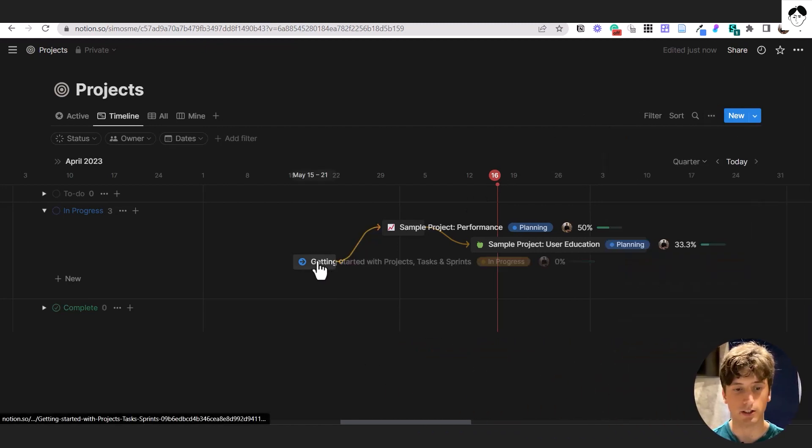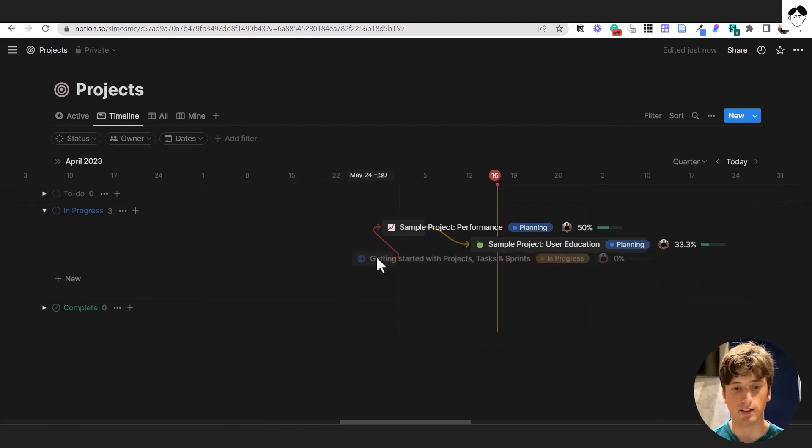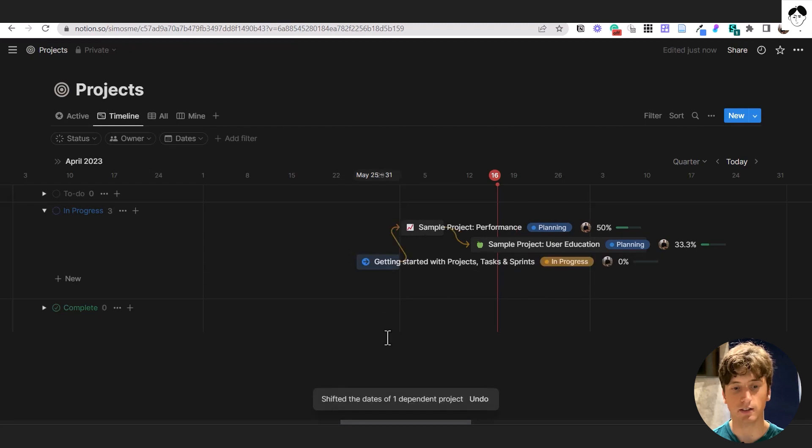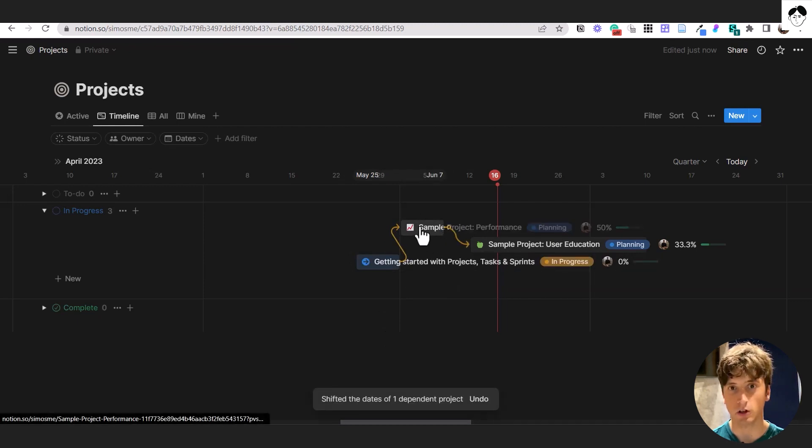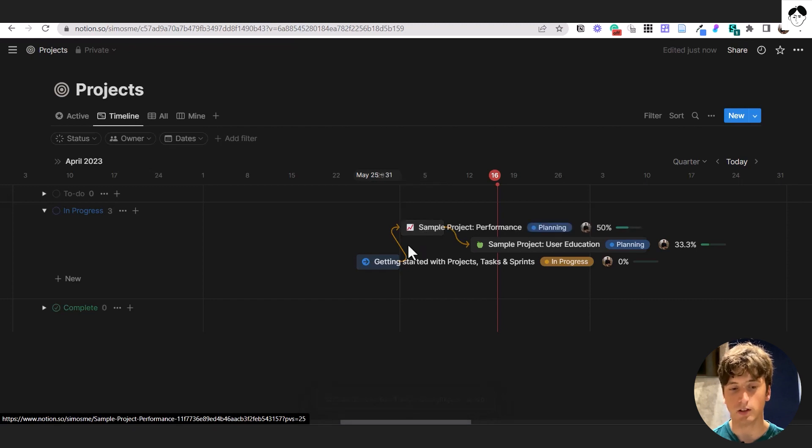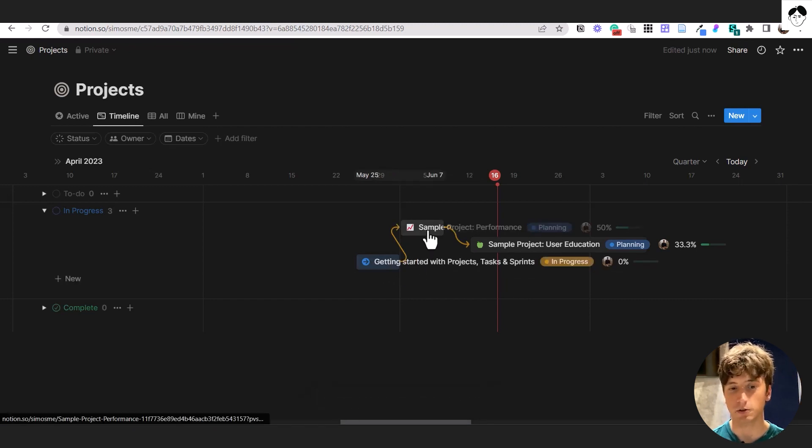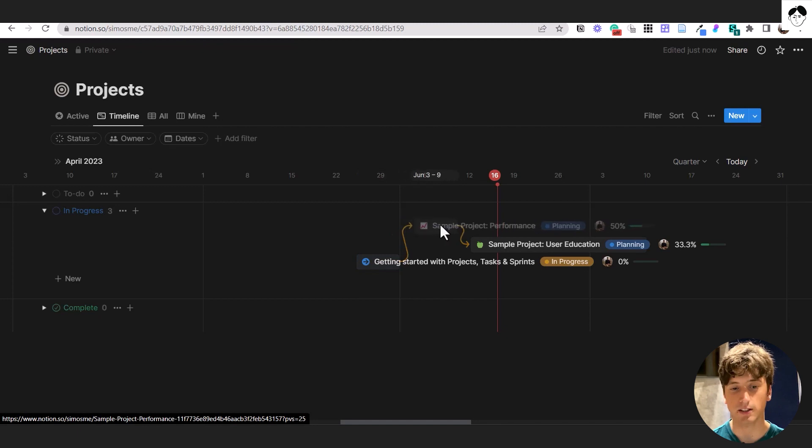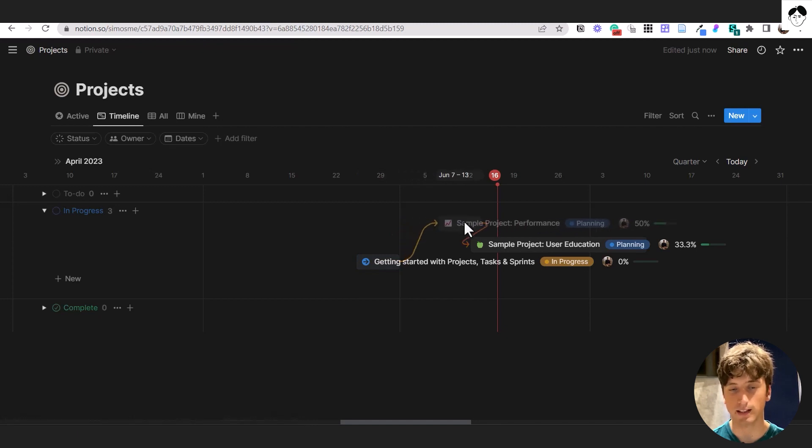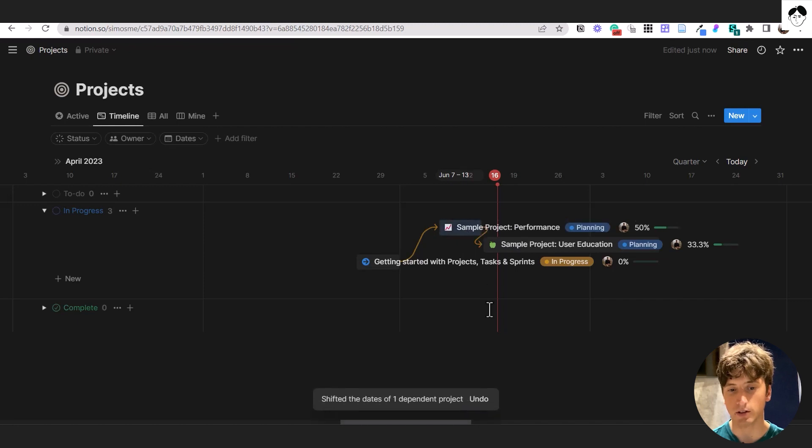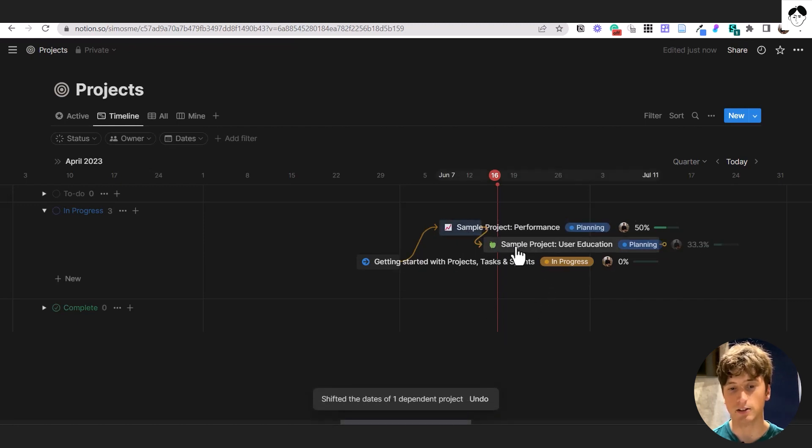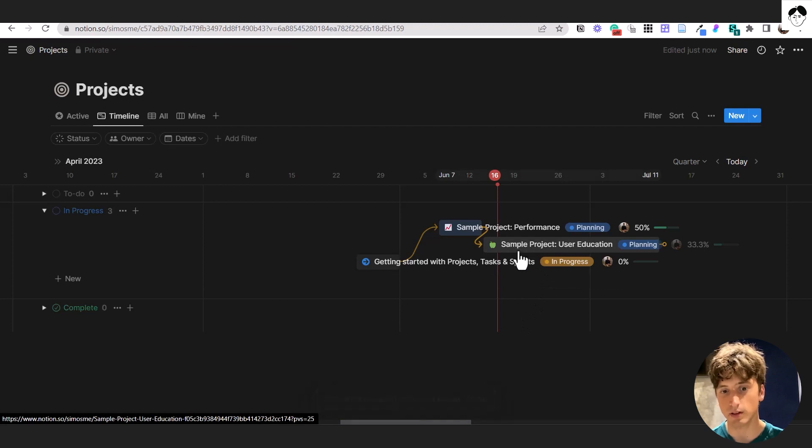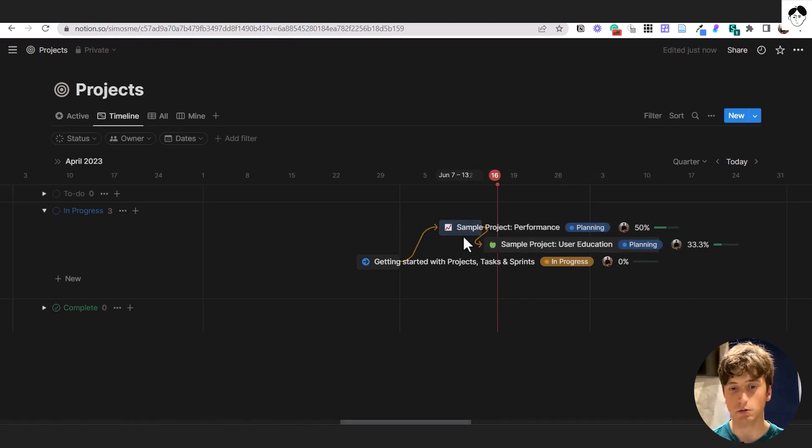So let's see. Let's change this date here. So I'm going to change it like that. And you can see that the sample project performance was automatically shifted because those dates were overlapping. So again, if I go here, for example, and this product is shifted like that, you can see the arrow turns red visually. And after I release the drag and drop, this project will be shifted forward to make sure that the dates do not overlap.